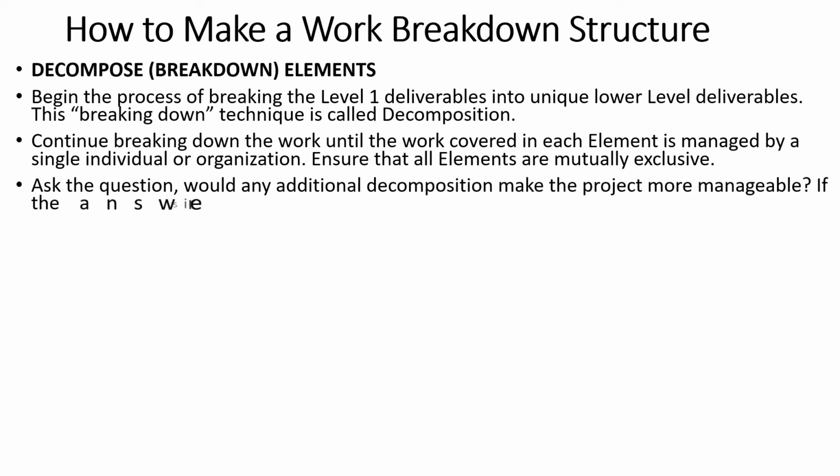Certain questions are required to be asked, like why any additional decomposition would make the project more manageable. If the answer to any of these questions is yes, then the activity or event can be decomposed further. If not, then WBS is done. If yes, then further decomposition is required.